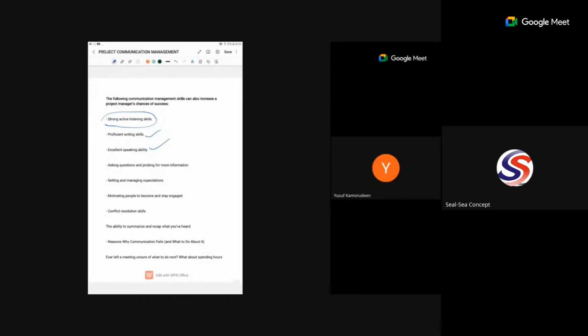But right now, the modern way is that minutes are prepared in a tabular form. You just write the name, what the person suggested, the resolution, what the people are saying. Whoever made a motion and objected to the motion, you don't care. It's just for you to itemize the key things that actually emanate from the meeting. Who said what? Did everybody agree on it? What was the course of action? Who is attached to take that action? That's all. The story and everything has been removed.